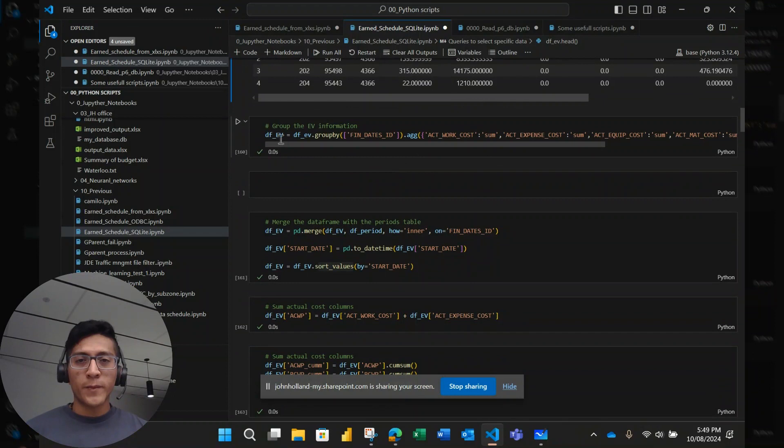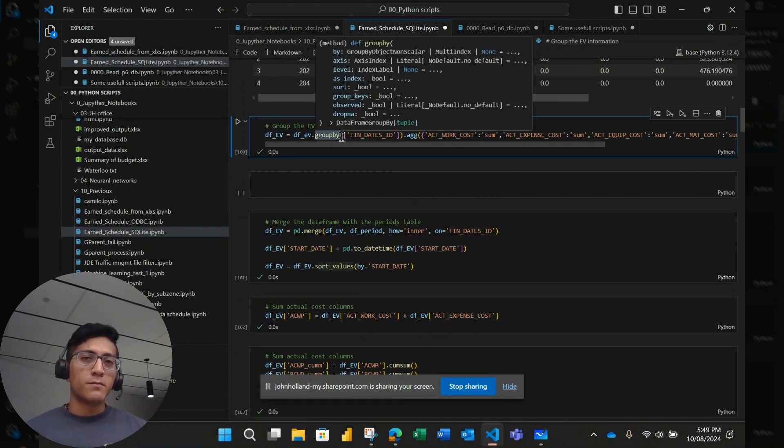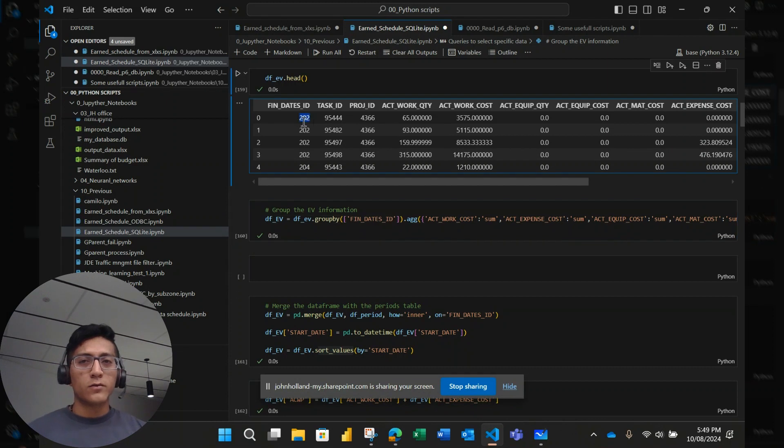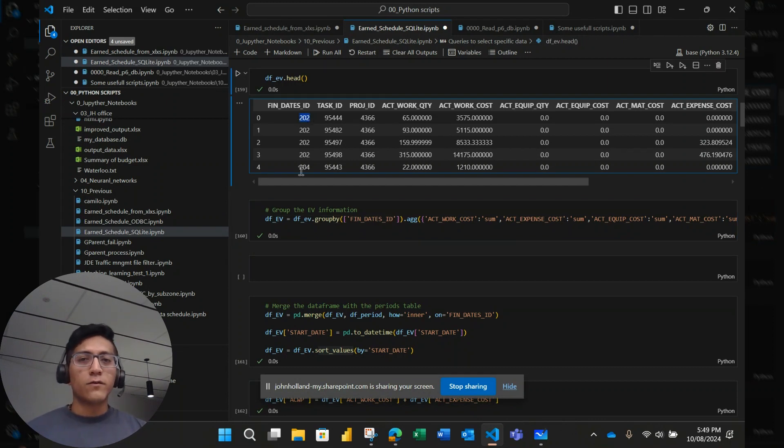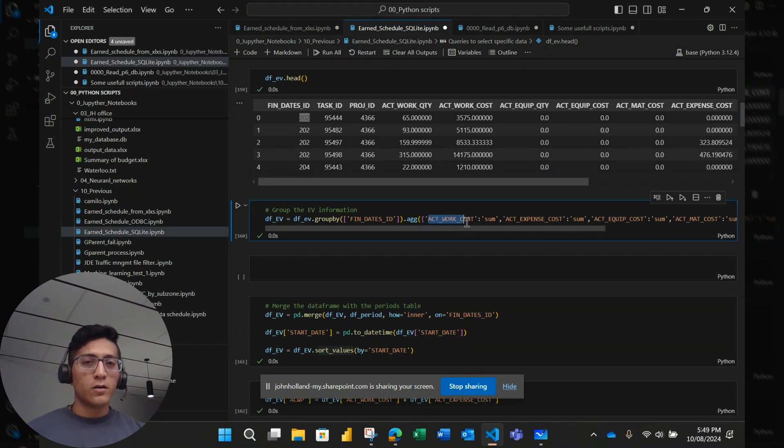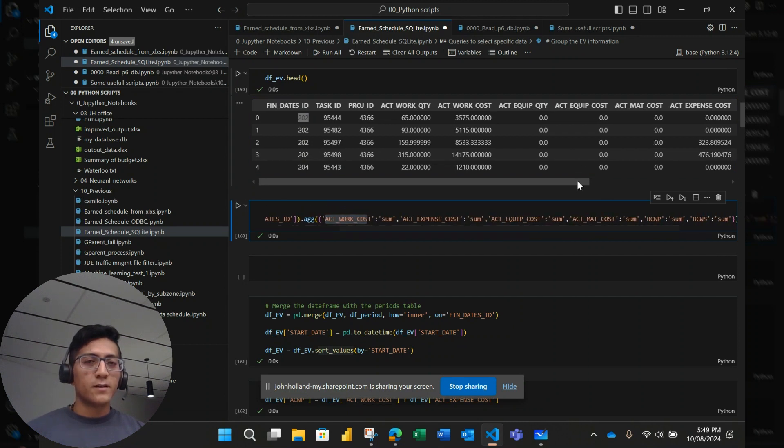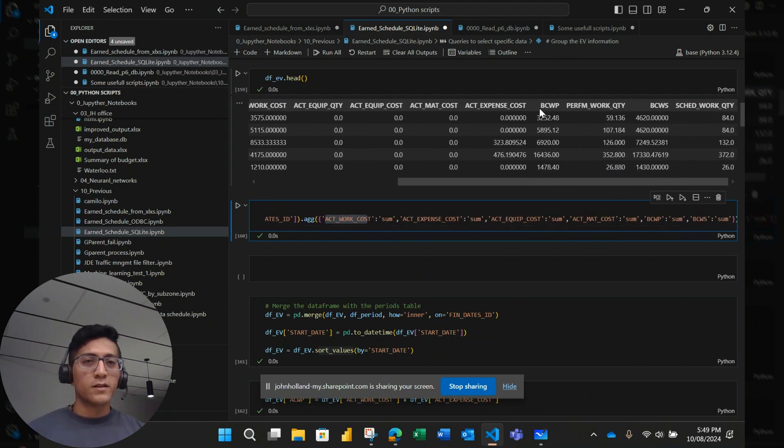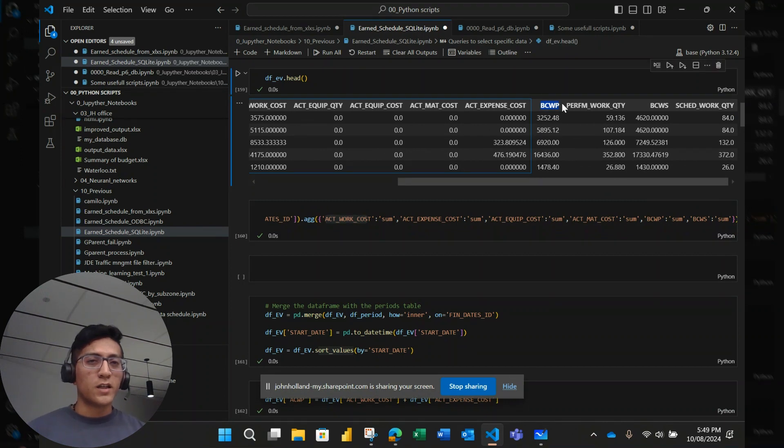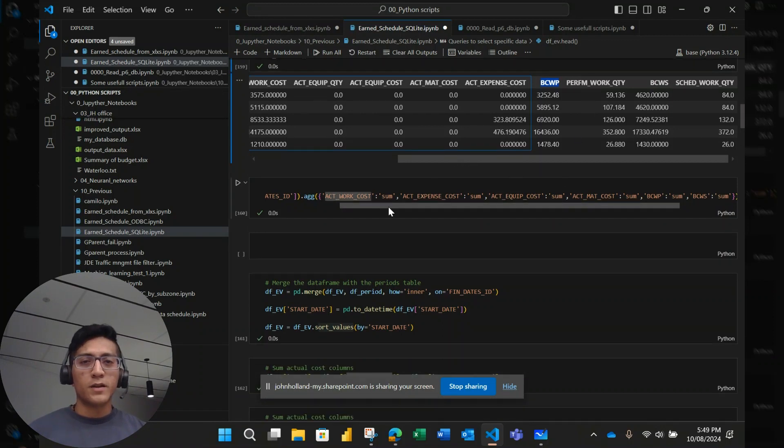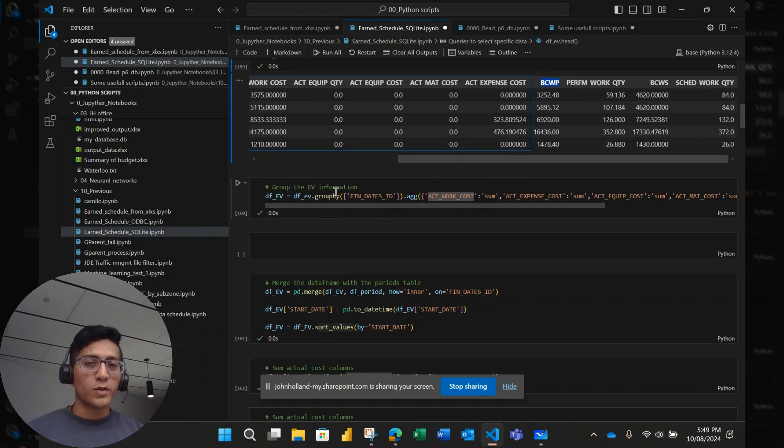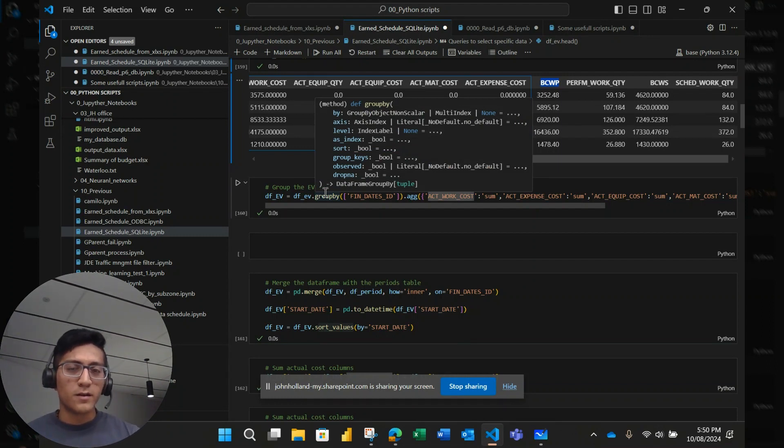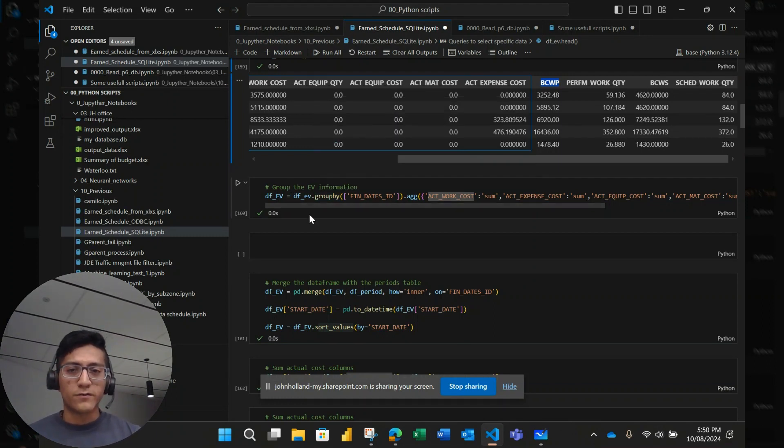So then I use this function, which is called group by, which makes a sum based on the fin date ID and the fin date ID refers to a period. So it could be like this 202 refers to January or 204 refers to April, you know. So all this, I'm grouping all the cost information, actual costs. In this case, P6 calls by the traditional names earned value, which is BCWP and planned value is BCWS. So I made this group by, I got this actually from Power BI and learning to use it in Power BI and then implementing in Pandas dataframes.